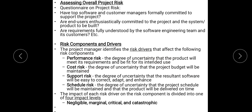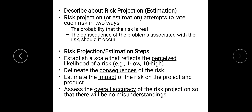Next is Risk Projection. Risk Projection is essentially estimation — it attempts to rate each risk in two ways: the probability that the risk is real, and the consequence of the problems associated with the risk if it occurs. The steps in estimation are: establish a scale from 1 to 10 for the likelihood of the risk occurring, then think about the consequences, then think about the impact, and finally assess the overall accuracy of the risk projection.